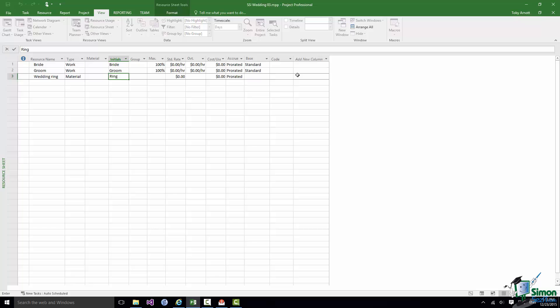Note that when I chose material some of the other fields, some of the other properties changed. So for instance Max was cleared out. It no longer said 100%, the default for a work resource because we're not talking about having a maximum number of rings. We can basically buy as many rings as we want subject to available funds of course. And similarly the standard rate changed from being dollars per hour to just dollars because we're not talking about a rate of pay for somebody, for a work resource, a person. We're talking about the cost of a material.